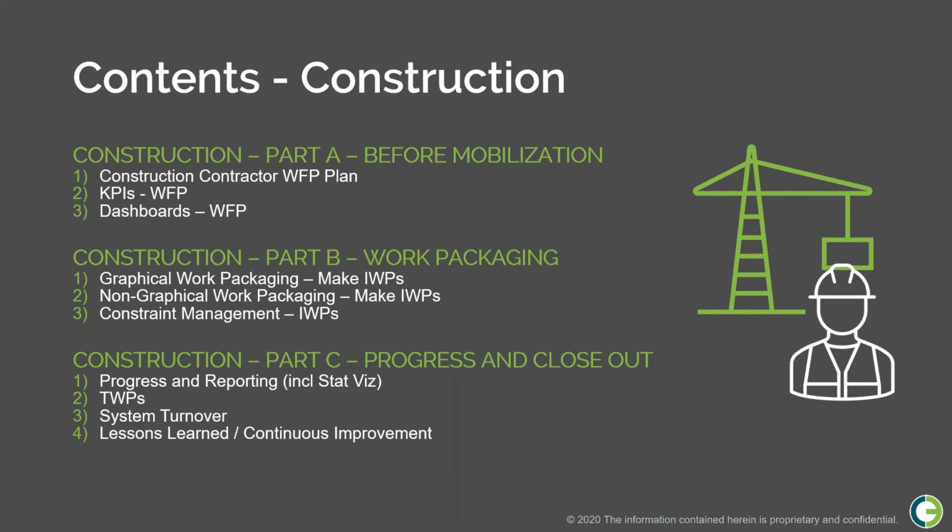And also, mobilization takes on a slightly different angle with doing upfront planning. You don't mobilize 50 people to site day one. You need to get your workface planners for your early stage work involved in time enough that they can build IWPs, do their constraint management, and get meaningful work for a crew to do before the crew arrives on site. Second stage.